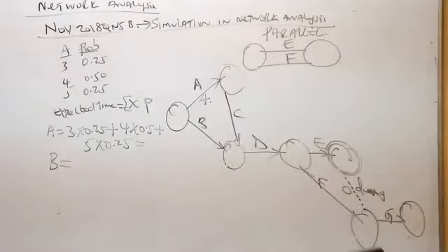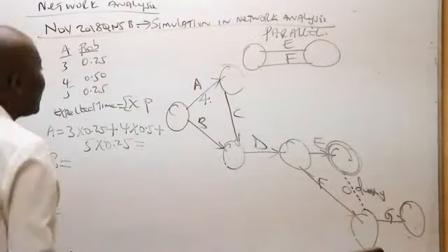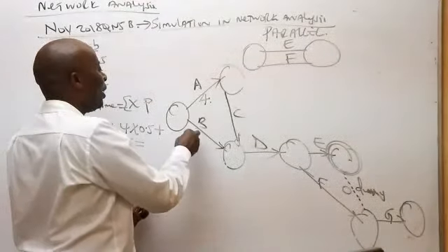Omar Abdi, thank you very much for diving in. It doesn't matter whether you've been with us from the word go or not. For now, we are getting the expected value of B. For B, I can see the 3-time estimates, so I'll take 4 times 0.15 plus 5 times 0.3 plus 6 times 0.2 plus 7 times 0.2 plus 8 times 0.15. Great. So they're telling me B is 5.9.